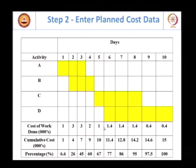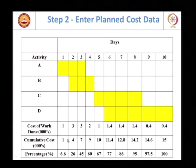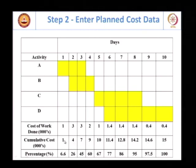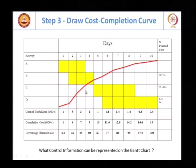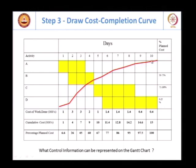The same values can be represented as a cumulative cost. Basically, on the first day that is 1; second day is 3 plus 1, that is 4; then add 7 — 4 plus 3 is 7 — and it goes on. This is how money is flowing through the project, or at least for that component over time. This is a rough graph of how the cash flows for that component over time for each day.